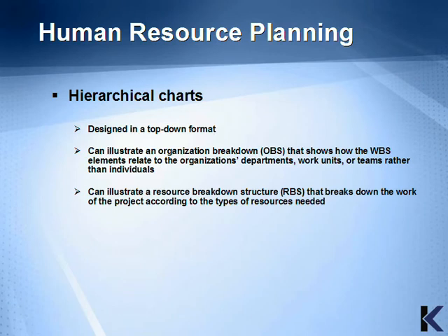Hierarchical charts are the typical format. This consists of a design in a top-down format. It can illustrate an organization breakdown structure that shows how the work breakdown structure elements relate to the organization's departments, work units, or teams rather than individuals. It could also illustrate a resource breakdown structure that breaks down the work of the project according to the types of resources needed.